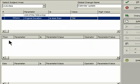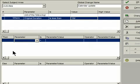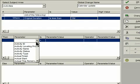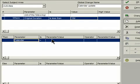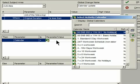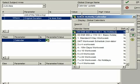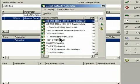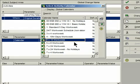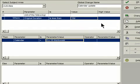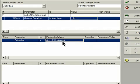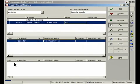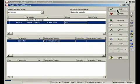If the Original Duration of my activity is less than 10 days, then, in the Then section, I add a new line. I'm going to make a change to the Calendar for that particular activity. So, I'll go down here and find the Calendar field, and I want to set that Calendar field to a new value. I want activities that are less than 10 days to use the 4 by 10 workweek calendar. If the Original Duration is less than 10 days, Calendar becomes 4 by 10 workweek. In the Else section, I'm going to leave it as is, just like that. I'll click OK.